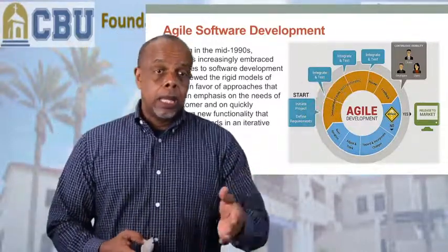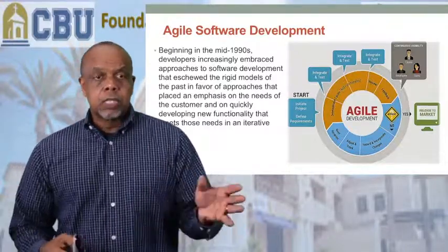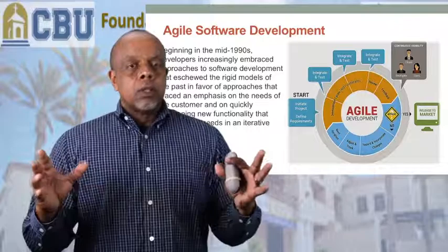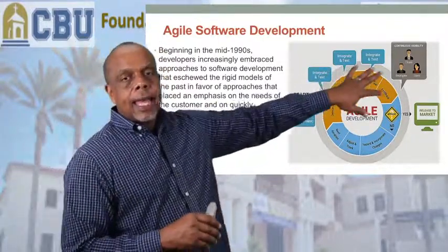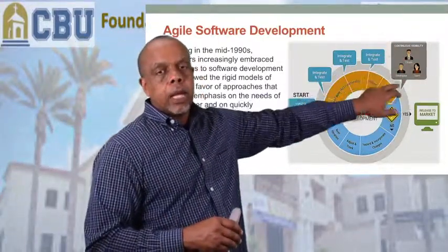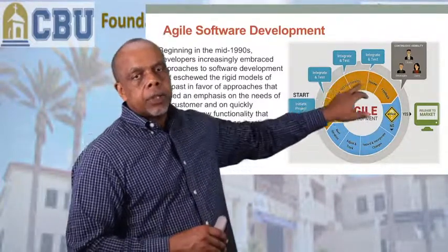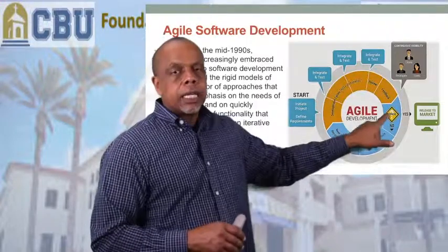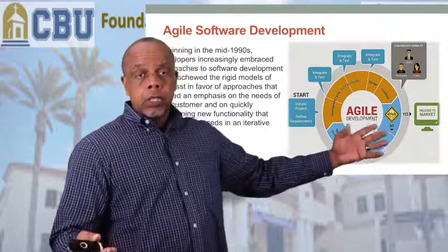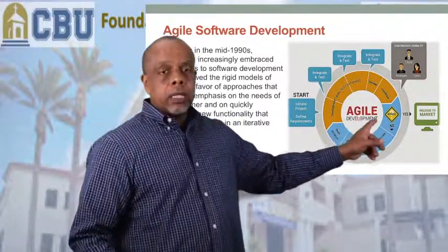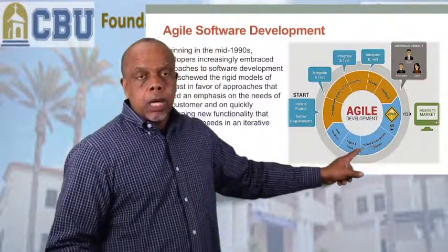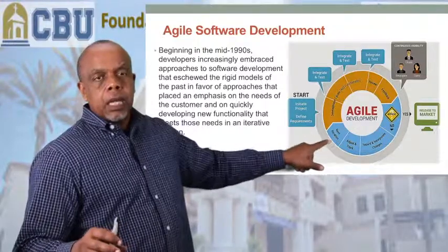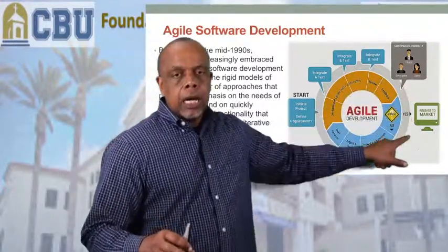Yeah, exactly, to do the user acceptance test. But if there were problems there, a lot of those weren't caught. But now with Agile, we have this teaming, and they're constantly monitoring each phase of this integrate, test. Now we get here, and if the product is good and the customer is happy, we can deliver it. Boom. But if not, we come back around and we record what the problems are, we do our adjustments, and then we start our next iteration of developing that.